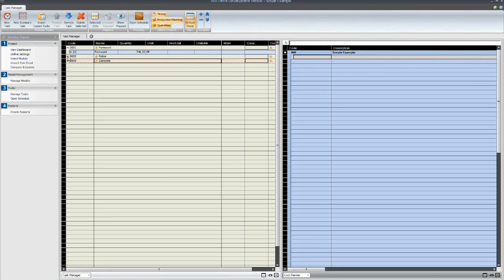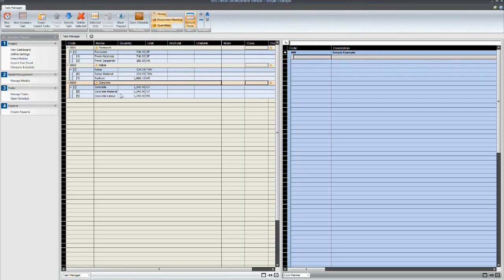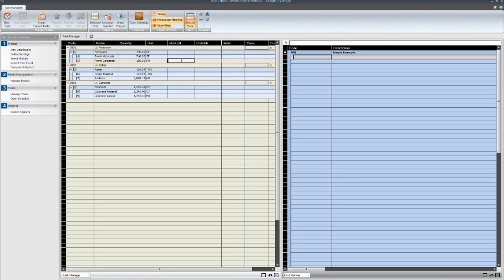And now if I open the tasks, now I have to decide what is the duration driver from those estimated items? So very typically, it's always going to be the labor if it's excavation and it may well be the machine. So I have to tell it that and I'll say that the form work is going to lead.